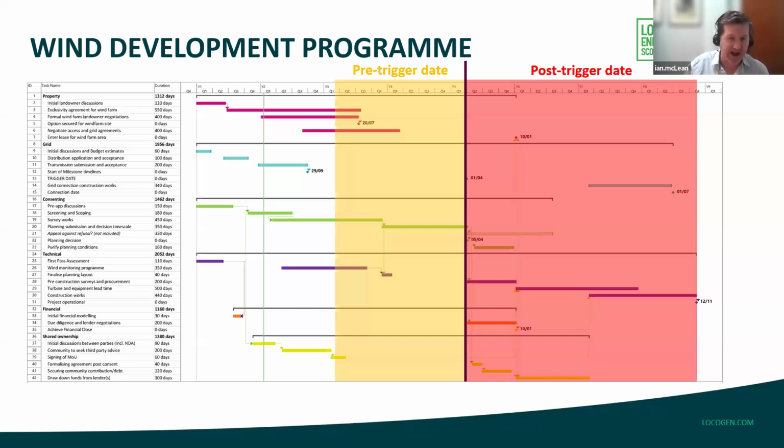Because, as you say, once you go through that and you accept that you are stepping through the trigger date, beyond that point National Grid are saying we are investing large sums of money in potentially reinforcing our network to enable you to be connected. And if you decide beyond the trigger date that you no longer want to progress with the project, we will be out of pocket, and the security payments and cancellation charges reflect the expected amount that National Grid is out of pocket should you pull out of the project beyond the trigger date.